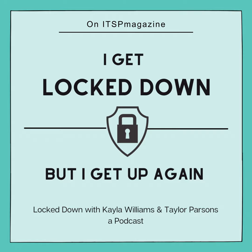Yeah, no, that's fair. And I've come across that not just specific to security, but like implementation of an LMS system. Nightmare. You start talking about internal training or onboarding of an employee within a certain department, and then all of a sudden it's, oh, if we're gonna onboard employees there, maybe we should publish our security awareness training there. Oh, okay. And then it's, oh, this doesn't work here, but this works here. And then HR is, oh, if you guys are going to do training and employee onboarding here, maybe we should do general onboarding here. And you're like, wow. That's scope creep, and that's where you need to bring all of your stakeholders together.